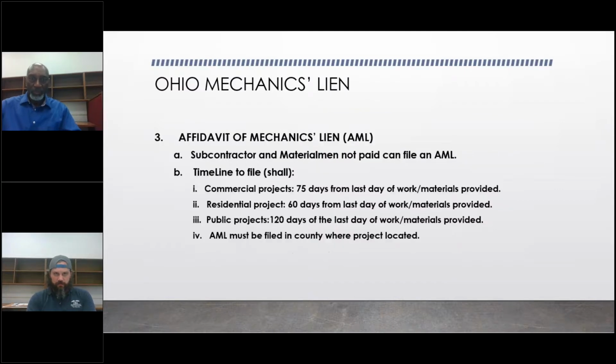I just want to add, while we're talking about it, a few of the things that you mentioned just kind of brought it to mind. For me, when I start thinking about lien rights, it's not always for the main contractor to an owner. That's also to protect subcontractors. You could have situations where an owner pays a general contractor, who has the work completed by a subcontractor, and the subcontractor doesn't get paid for one reason or another, cash flow issues, or you name it. Potentially that subcontractor has lien rights on the overall owner and on the property, so that he is sort of insured, so to speak, to make sure that he's going to get paid up eventually one way or another.